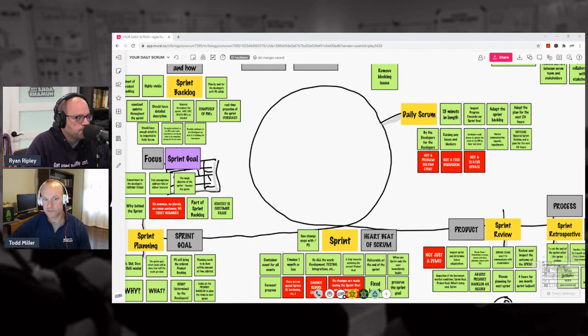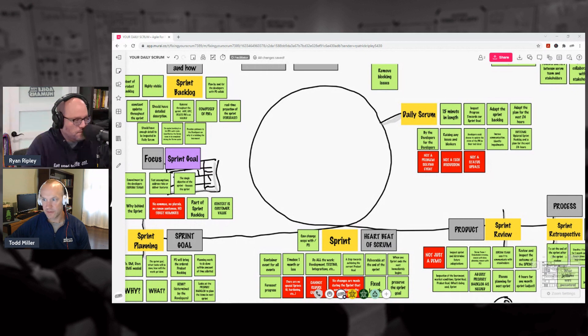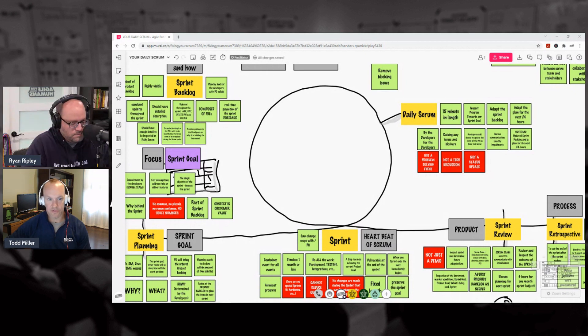The sprint is happening already when you're in Sprint Planning, but that's that first thing. I think it is very logical for Sprint Planning to happen straight away. And also something that's interesting—and I think we get stuck on with all of this—is that your sprint can end halfway through a day and your next sprint starts in the afternoon. It doesn't have to be, we don't have day boundaries in sprints. So if you have a Sprint Planning on a Wednesday afternoon, your new sprint has started Wednesday afternoon.